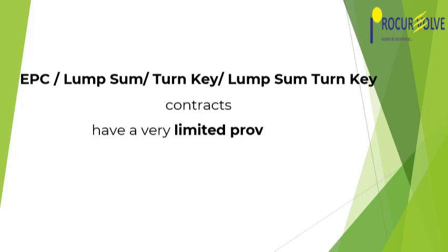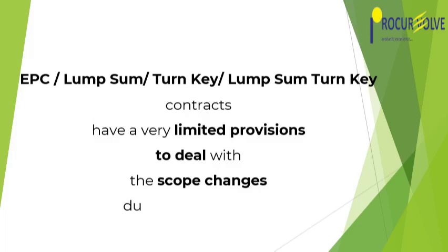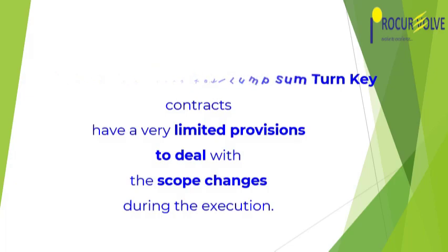So now when the project developer organization has very limited detail about the entire project at the inception stage of the project, and if they want to have various changes to be implemented during the execution phase of the contract, and if they want to have better cost transparency, there is another model of contract which is called cost plus model of the contract.